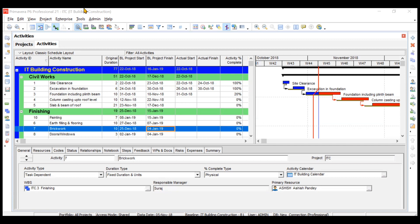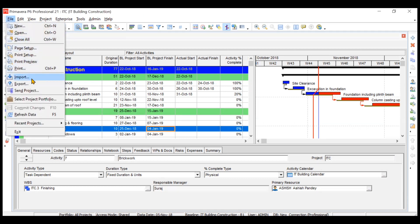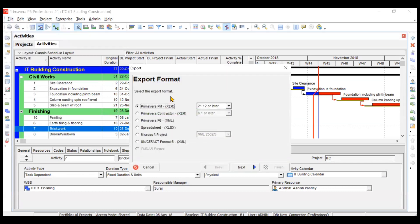I have opened a project — ITC, which is IT Building Construction. If I open one more project, it will show a comma and the name of the other project. Now go to File and then the Export option. You can export the project or resources and roles into formats like .XER, .XML (Primavera extensions), Excel spreadsheet, and Microsoft Project formats.